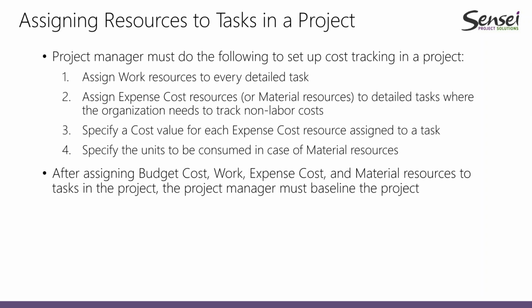After we are done and our planning phase, I would say, is finished, all we have to do is set up a baseline, so then we can get started tracking the variances, and understanding the amount of work and the amount of cost that has been planned and budgeted, and the amount of cost that's being tracked, the actuals, the variances, and everything that we can compare against our baseline.